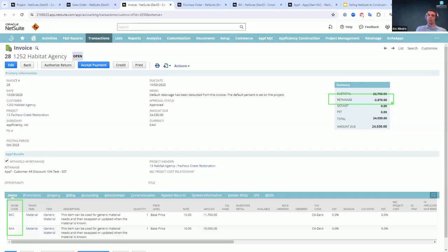If you're familiar with retainage, that's just the retention of a specific amount or specific percentage of the overall contract that you have with your subs. And you're going to hold on to that amount until they've completed their scope of work for that specific phase of the project, right? And then you'll release those funds or pay those subcontractors once they've completed their scope of work.